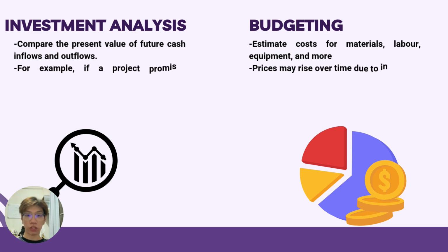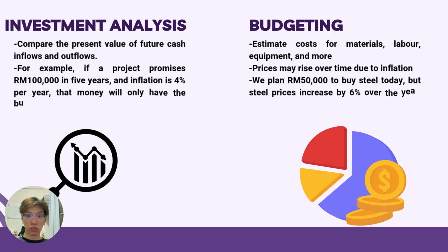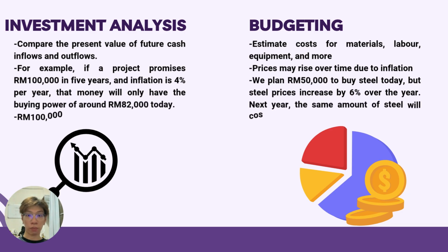I will explain how inflation affects engineering economics. Let's start with investment analysis. When engineers and managers evaluate a project, they must compare the present value of future cash flow. If a project promises 100,000 ringgit in 5 years, but inflation is 4% annually, that money will only be worth about 82,000 today. That's because over time, inflation reduces the purchasing power of money. So if we ignore inflation, we might think a project is more profitable than it really is. This is why we discount future value using a rate that includes inflation.